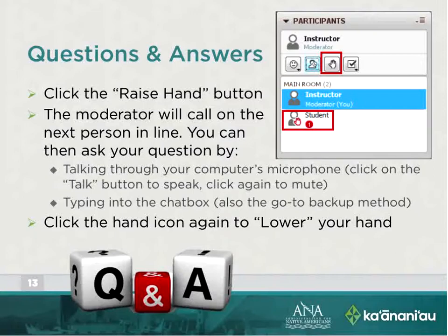No, you don't. That's within your authority to implement. Like I said earlier, the only thing that we would like to be able to do is to ensure that the grant that you're implementing is currently reflected in our grant system. So if you're changing categories, you're doing a budget mod to put more monies in supplies and something else, if you could just send us an email saying that I've changed the following categories, we will put that in the official grant file and it will be noted.